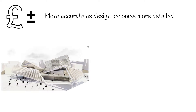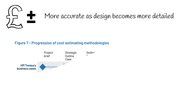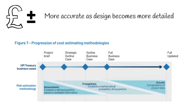The scale and complexity of a project will also affect the quality of cost data available. Repeatable projects will have more reliable benchmarks and cost data, as opposed to more bespoke, one-of-a-kind projects which may lack reliable data. This figure, produced by the Infrastructure Projects Authority, shows how the estimation method may evolve as the project progresses.